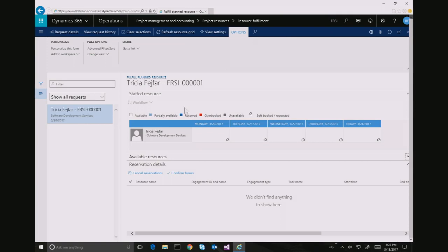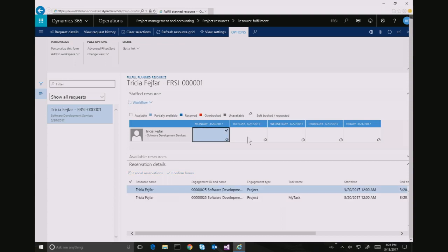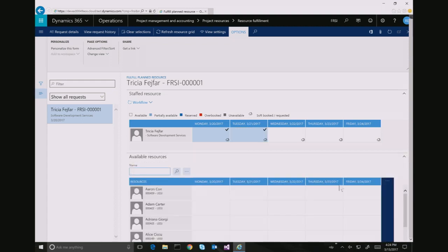Certain someone is asking to have Trisha assigned for 5 days. And as much as I'd like to accommodate that, I'm not sure if I can completely accommodate that. So what I'm going to do is I'm going to let Prakash have her for the first 2 days. And then he's going to have to settle for someone else for the next 3 days.